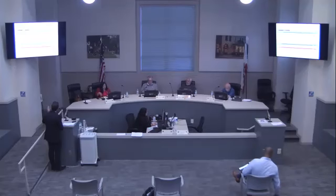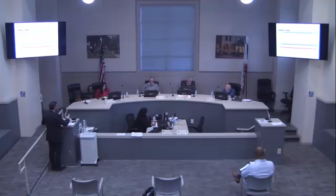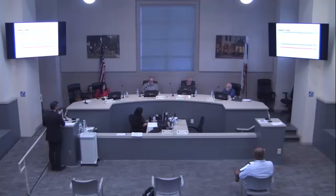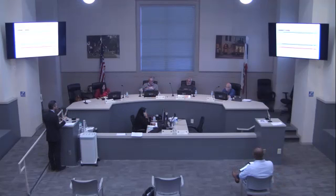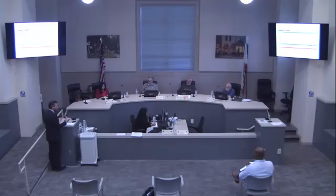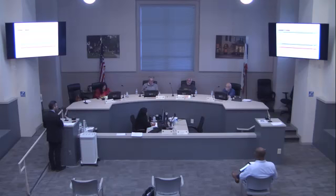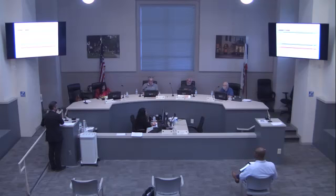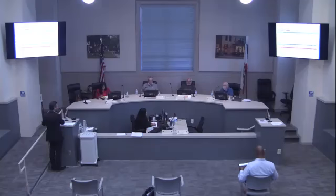Rounding out this page — Sewer. From our One Water Master Plan, we found a roughly $15 million liability in sewer repair over 30 years. Dividing that out, our requirement is to spend $500,000 per year. We know which sewers need to be replaced, but we want to be strategic — coordinating street repair with sewer repair, water repair, and any other utilities such as Edison or the gas company — to reduce costs. We haven't yet done that evaluation, which is why you see sewer as a lump sum for now. As we figure out which projects move first, we'll split them into specific projects.